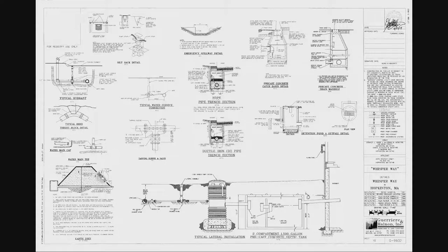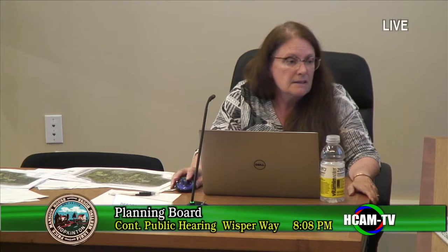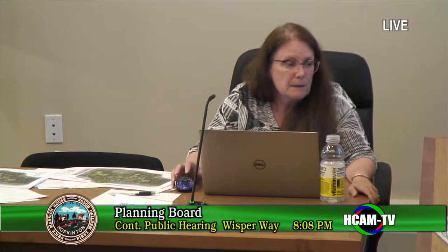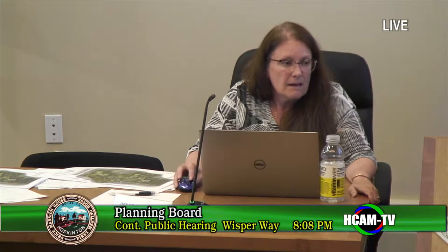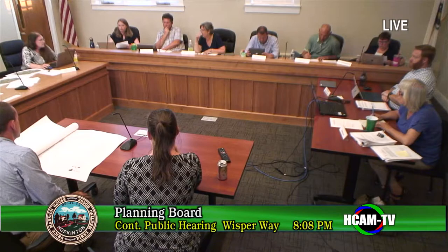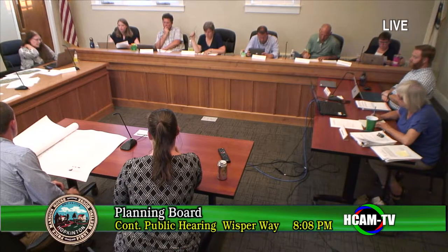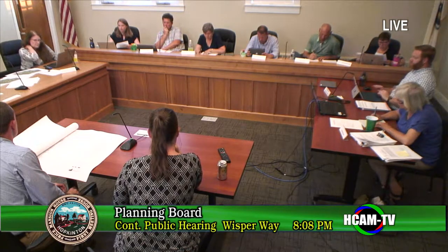I would say that I'm not comfortable with that. We've been through some really pretty horrible building experiences where we're in the middle of the spring and we're trying to get a stabilized site, and we have a lot of difficulty. I would want to maintain it. First, I want to get ComCon's impression of it before I said anything. So that's kind of my concern. So you can condition it on their approval. We're not necessarily going to be able to require them to tell us how they feel about it. Okay. I would make it on condition of their approval.